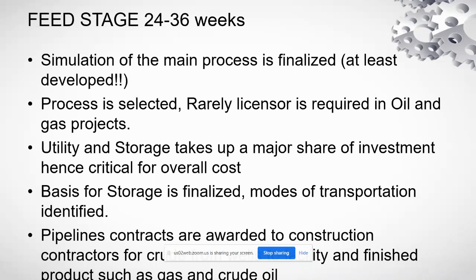The longest piping I have come across was for finished product petroleum transportation in Saudi Arabia. It was around a 400 kilometer pipeline. So you can imagine the time required for construction of these pipelines, and that is why these contracts are awarded at a very early stage.